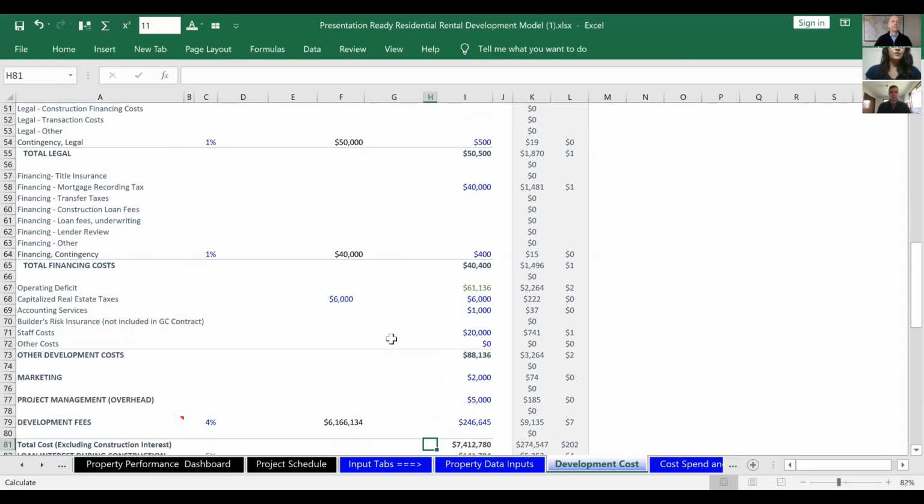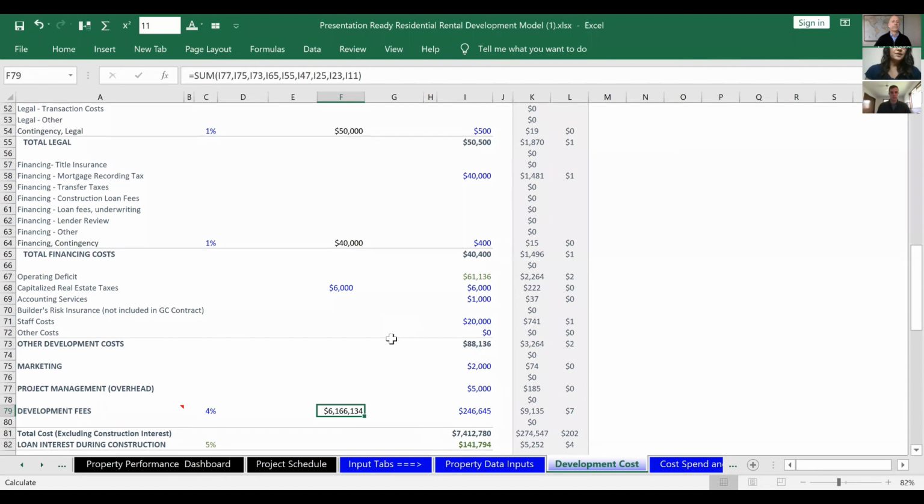And the development fee as well. When it comes to REITs, this covers all of our overhead. So this number could be 6 or 7%. Typically for smaller firms, I've seen where they'll lower this number so that they'll make their numbers work, because it's actually just a fee. So just keep in mind, this could be just a fee, or it could cover a lot of overhead.